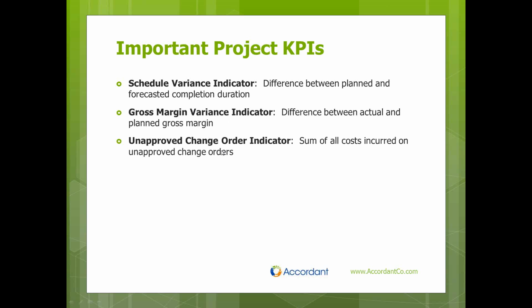Unapproved change orders, another important thing to track. That's the sum of all the costs incurred on change orders that have not yet been approved. You've got some financial exposure there if you're incurring costs and the owner has not yet approved a change order.